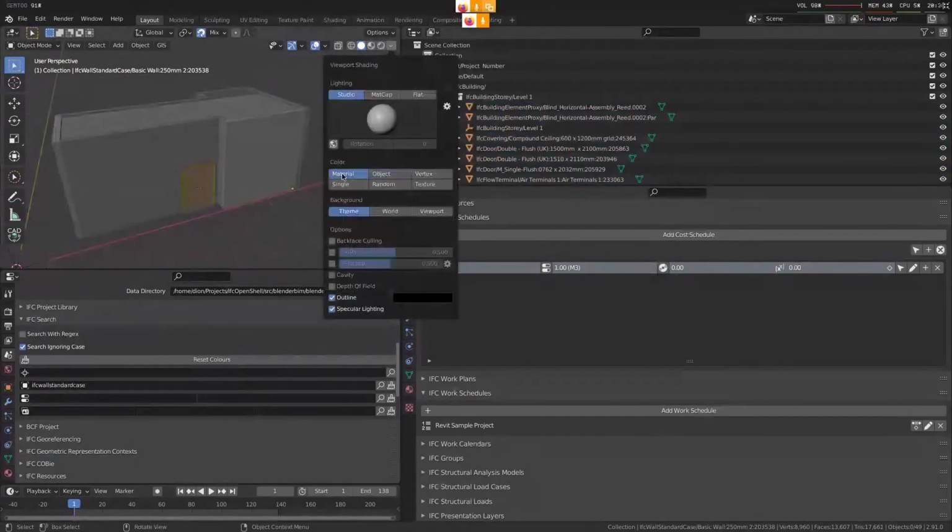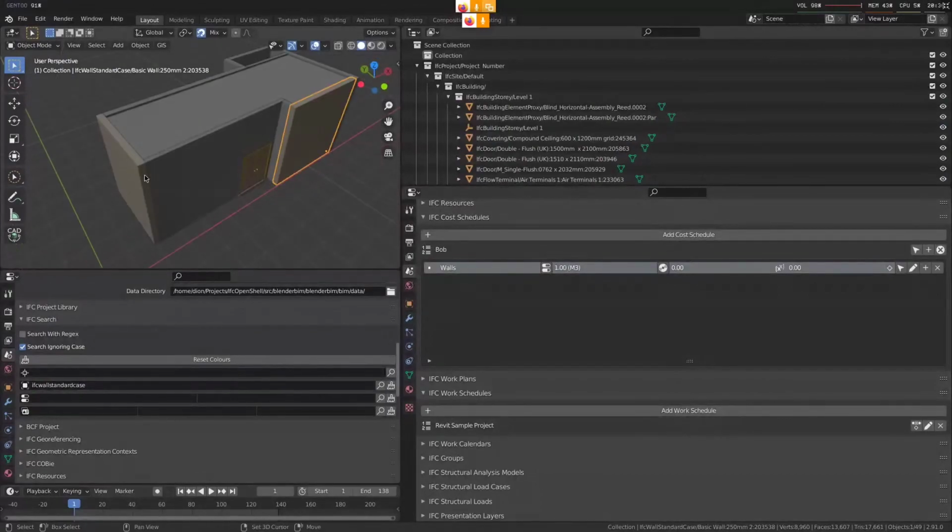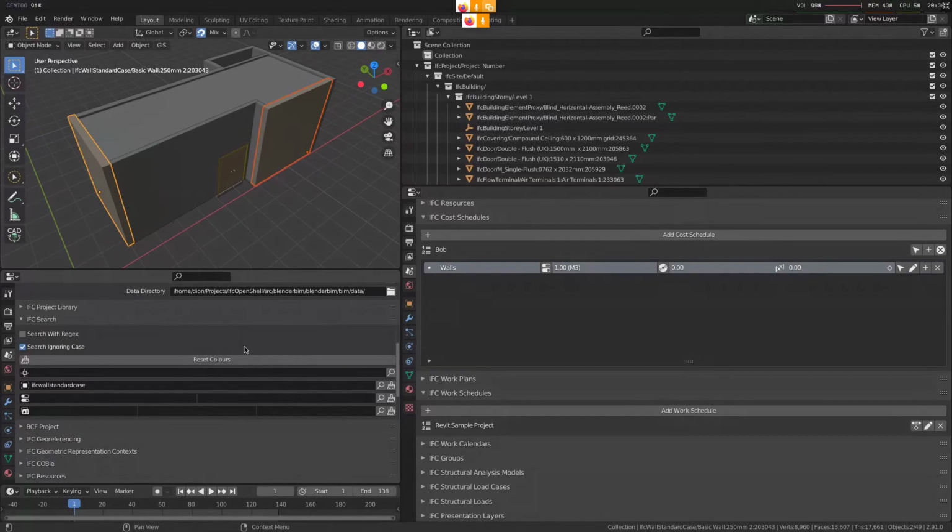And let's get my color. So let's say I'm costing some walls here, and costing must be linked into a quantity and a unit value. If you're quantifying nothing, it defaults to 1, and the unit, which is meters cubed here, is hard coded at the moment, which is totally wrong. In the future, it needs to be renamed to whatever the detected quantification is. So if it's length, it will show whatever the project length unit is. That still needs to be done, but it's just aesthetic. The quantification does work.